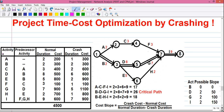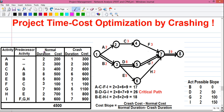Looking at the table, there are four columns. Number one is the activity column, where all the activities from A to I are listed. Next is the predecessor activity — an activity which must be completed before another can start. For example, activity A must be completed before activity C can start. Next we have normal duration and normal cost. Our unit for time is days and for cost is rupees. Activity A takes 2 days and costs 200 rupees to complete in the normal scenario.